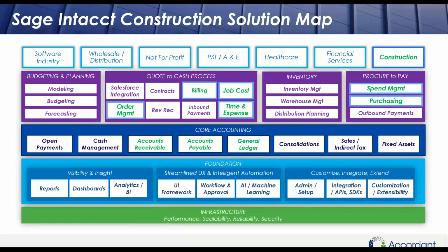We're now 6 releases in, and you'll see some very noticeable enhancements over ways we've done things in the past. A couple examples. We have a more flexible work breakdown structure. So those of you that want different cost code structures on different types of work, you can do that today. You're not encumbered by having a structure that has to be consistent across all projects. Though in best practice, we would recommend by job type you set up a standard and use our catalog of cost codes to standardize that.